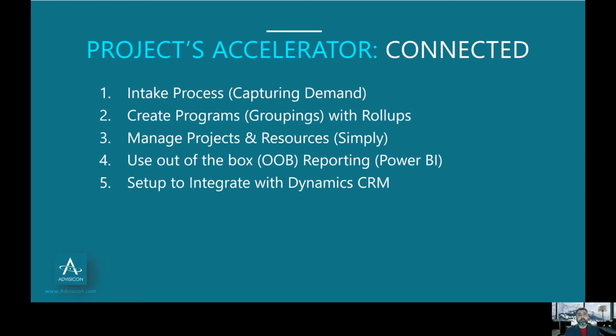The other part is that in general, if you go to Teams, the same security schema that Planner has uses this open schema of, hey, if you're in Active Directory, I can pull you and put you onto a team. Well, Project Online, or Project Server, for those of you that remember the on-premise version, has a fully blown resource pool. There's a lot we can do there in terms of generics. So this marriage of bringing in a resource pool or other resources needs to be helpful, and not just with living people. We really need to budget and plan for what work activities there are, what skill set or trade craft we need to bring in. We don't know who's available, but we want to take a look at that.